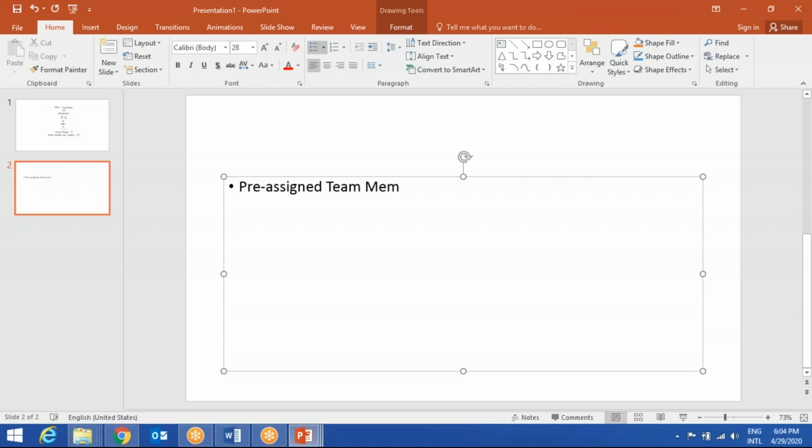Let's look at it this way. Say for some reason, I know some scarce resource is needed in my project. I'll cite examples. Say there were a couple of resources who were involved in the proposal making stage before we initiated the project. So some people were involved in proposal making a couple of months ago. Later, the contract was awarded to us. We are now initiating. Now, it's a good idea to get those two team members who were involved in the proposal making stage. And why? Because they already have a fair idea about the project. I hope I make sense on this one.